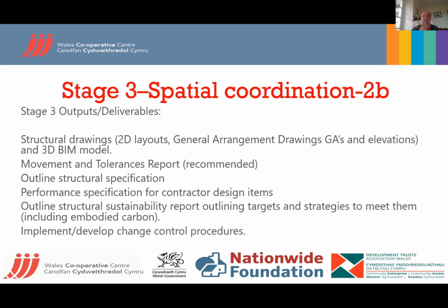So the deliverables from this stage for structural, you maybe get some simple 3D layouts, tolerances, online structural specification, timing, sustainability, including embedded carbon in the things that you're putting in, and the process develop changes if you're flexing it. It's harder to change as you move beyond this. And sometimes you may want to go beyond what the tolerances are for, you know, a British standard,